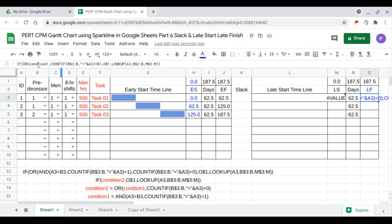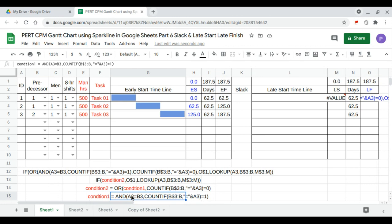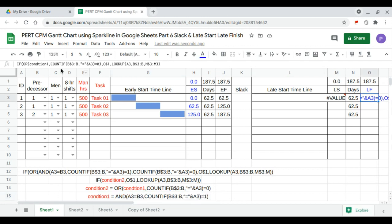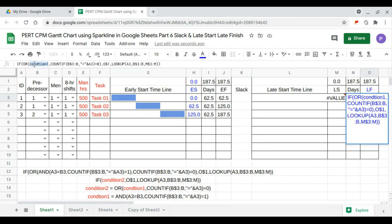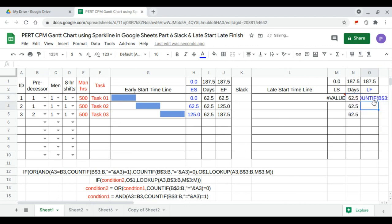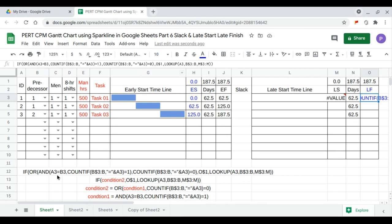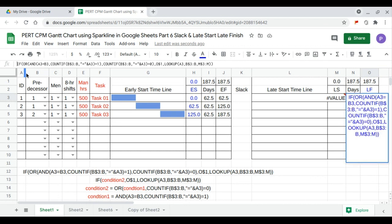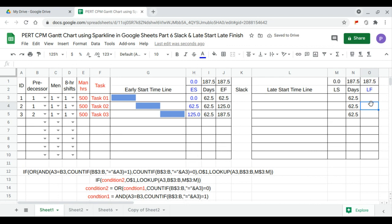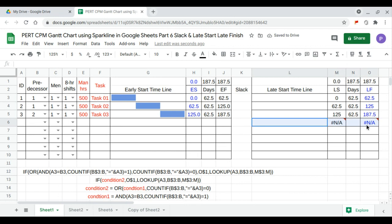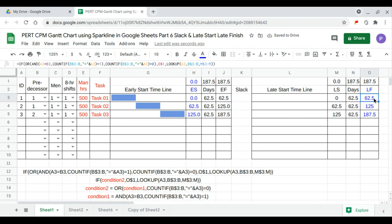Condition one is: NA equals A3 comma COUNTIF of B dollar 3 to B equal to A3 equal to one. We copy condition one and replace it into the full formula. This expression now matches the complete structure, so we can enter the equal sign.